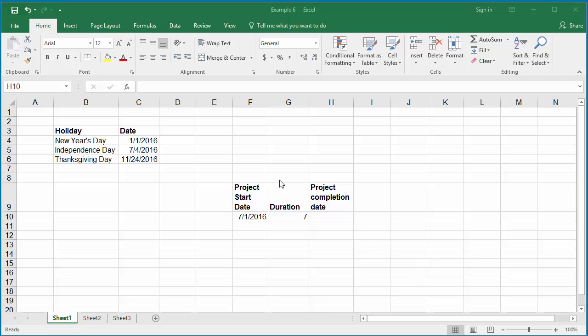The example worksheet has the project start date in cell F10 as July 1st, 2016, and duration as 7 days in cell G10.